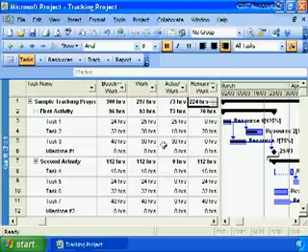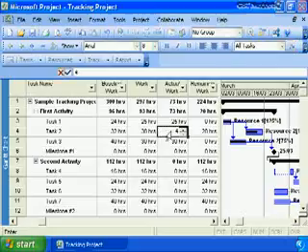Entering this information into Microsoft Project is as simple as going to the appropriate line, task number 2, and entering the detailed information into the task. So in this case, we want to make our actual work for task number 2 a total of 42 hours for the task. So we put 42 in there and move out of the task.